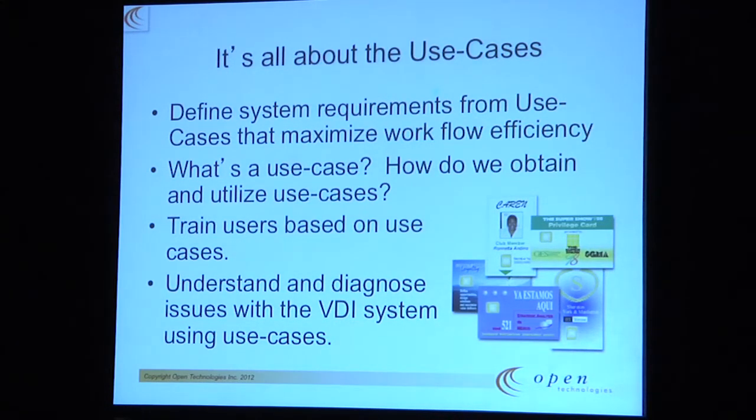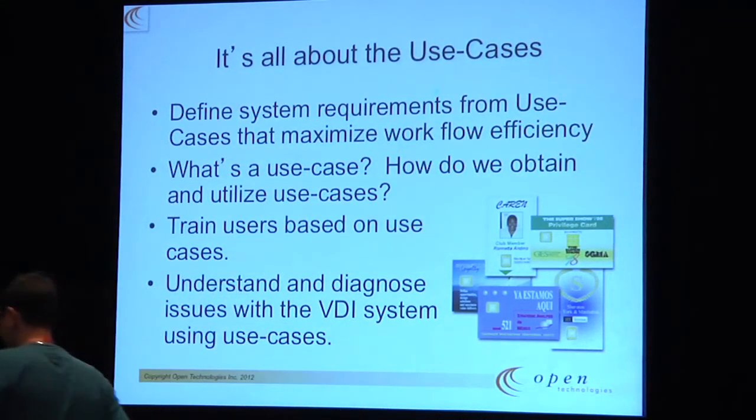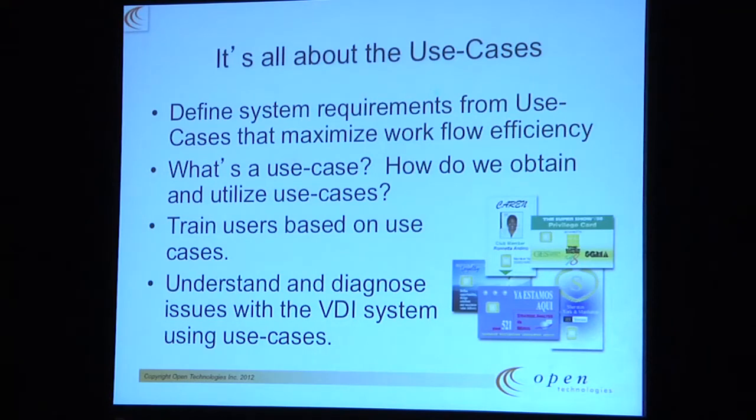What we define as a use case is really, in this case, a nurse. A use case might start from the moment the nurse, and it's a documented procedure, documented action or workflow, walks up to a terminal, a thin client. If she's using a smart card, use a smart card. If it's biometrics, proximity, whatever it might be, she walks up, she logs in this certain way, this app launches in this way. Then she, or he, does this, this, or this, and logs out. You define those patterns of various steps as use cases. So it's all about the use cases.